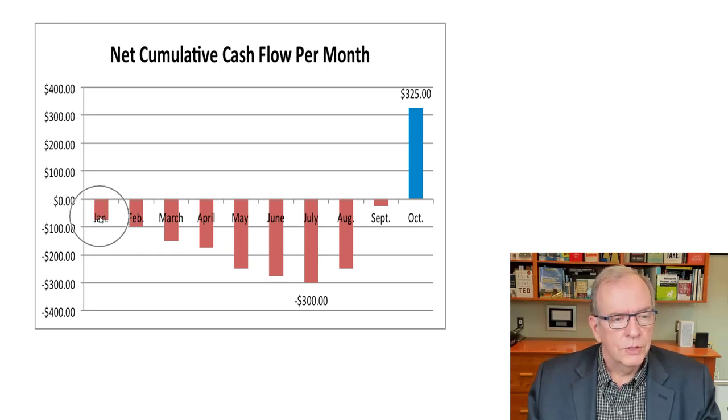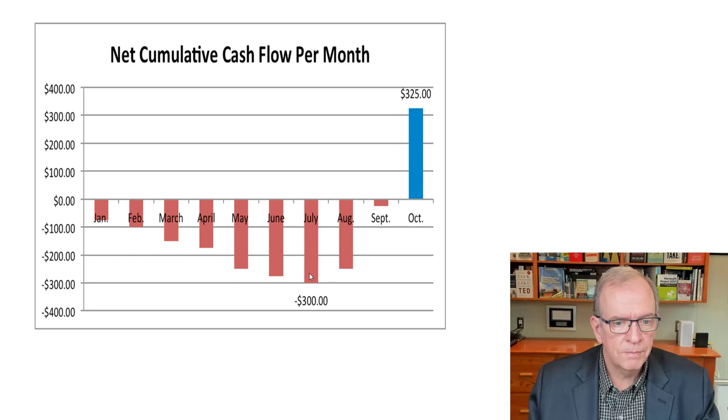So after substantial completion. So we can see the negative amounts building up through here, and it peaks out at minus 300, and then it gets to be less. Right? So it peaks out, and this is cumulative. So this is important. It's cumulative. So our worst negative amounts are during this time period here. And that's significant because you would want to make sure that at the very least, if you can't correct any of this, you would want to make sure of what? What would you say from a running a business perspective? Think about it.